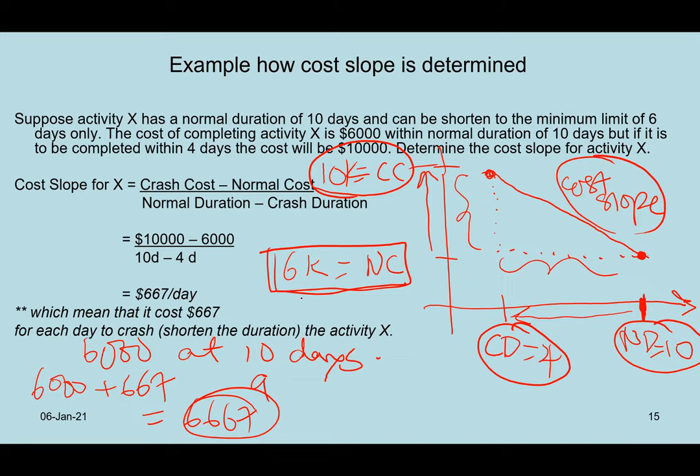Then you get one equation. Okay, one equation, 667 per day. So meaning to say, the original duration is 10 days, equivalent to 6,000. If you want to reduce the project to 9 days, meaning to say, now the cost will be increased by